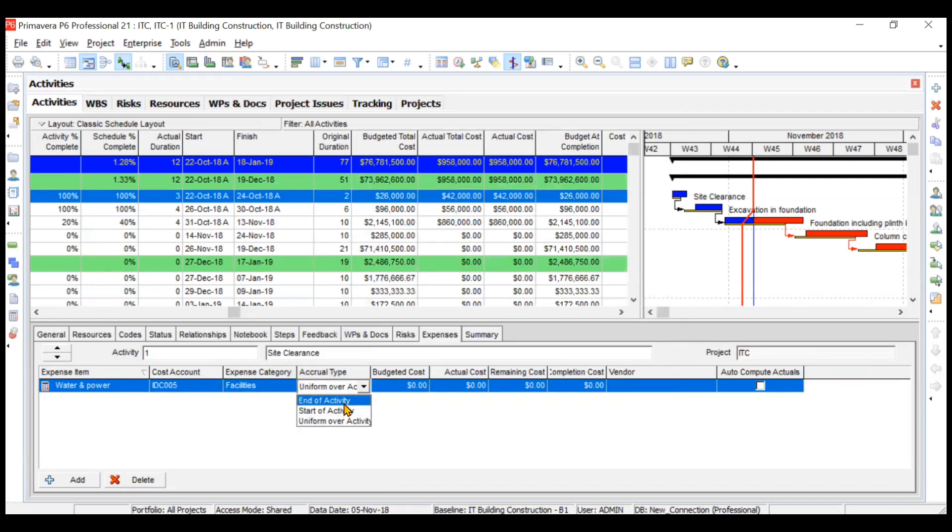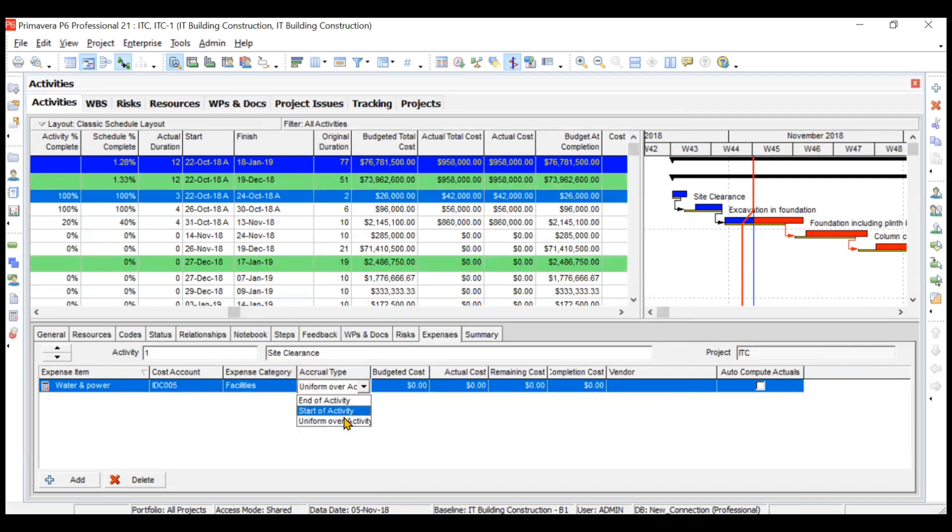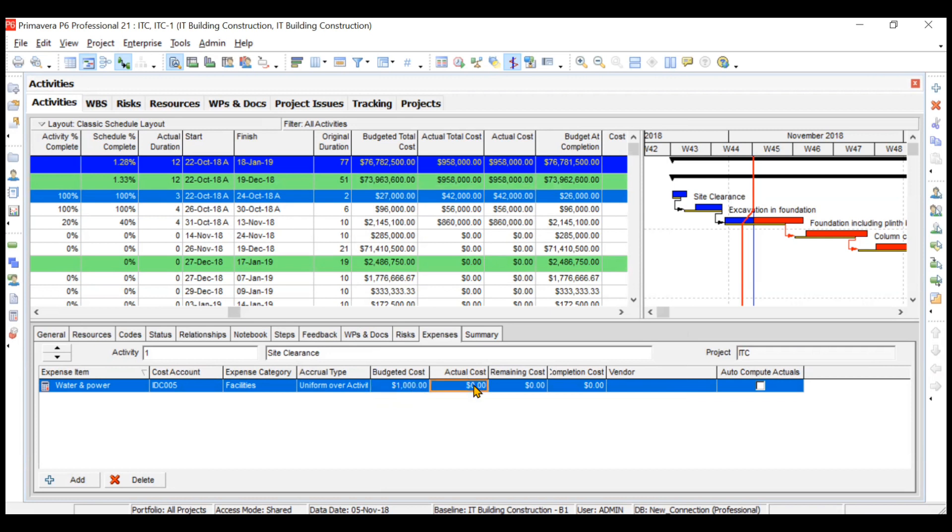What is the accrual type—whether it will come at the start of the activity, end of the activity, or uniform? We will say uniform because it will go throughout the activity. What is the budgeted cost? Let's say you budgeted $1,000. What is the actual cost? Let's say $2,000—you have exceeded the cost. What is the remaining cost? Let's say zero.